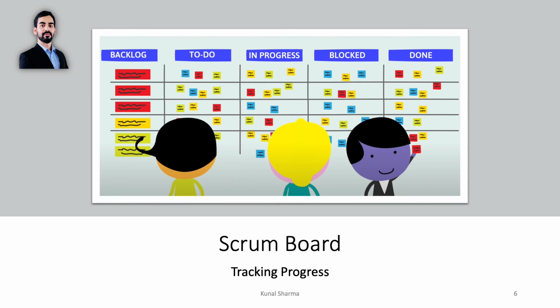What is a sprint board? A sprint board is a tool to visualize the progress of the sprint. The design or the number of steps in the board can be customized according to the requirements. The 5 steps board, as shown here, is usually followed in IT industry. The team prepares the backlogs from sprint planning ceremony, and as user story progresses, the state of the user story is changed according to the sprint board.